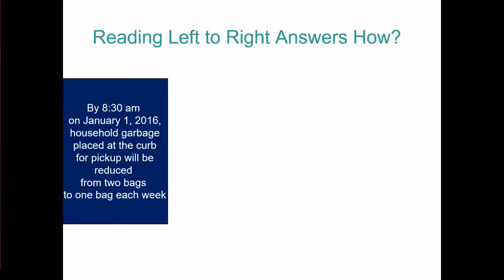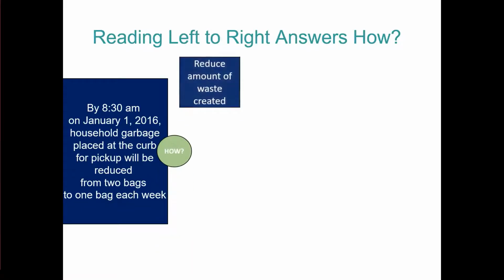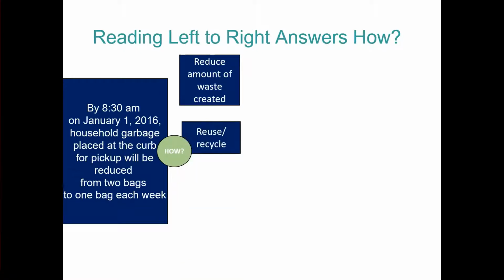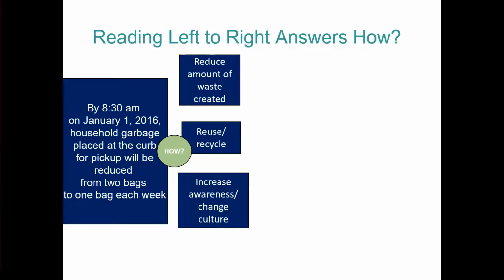So asking the question how: how are we going to reduce from 2 bags to 1 bag each week? We're going to do that by reducing the amount of waste created in our primary driver, reuse and recycle, and increase awareness and change the culture.